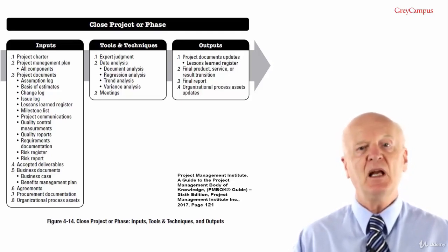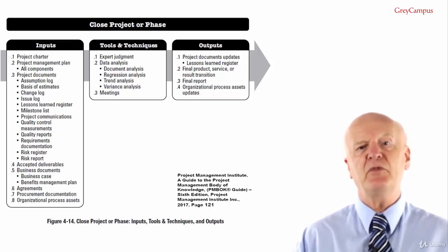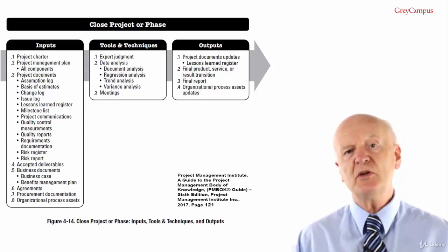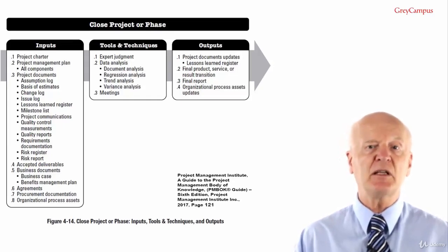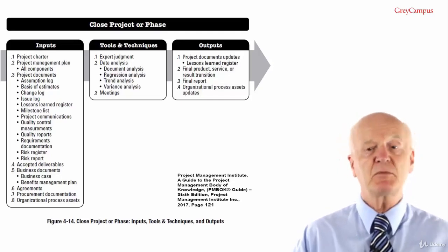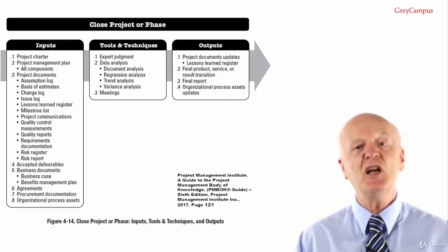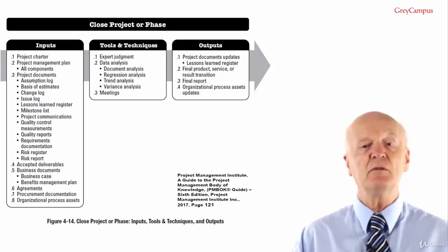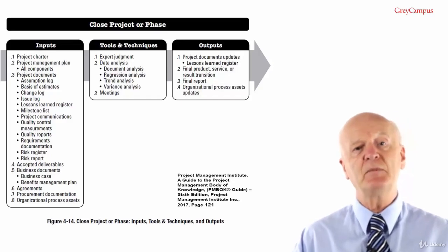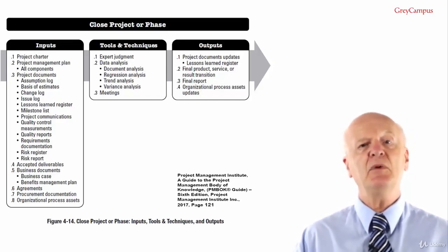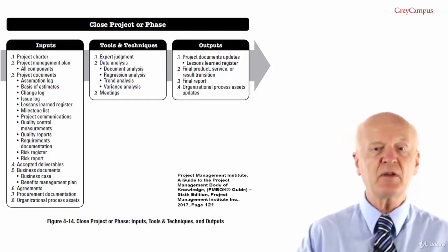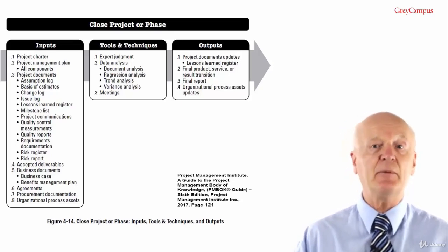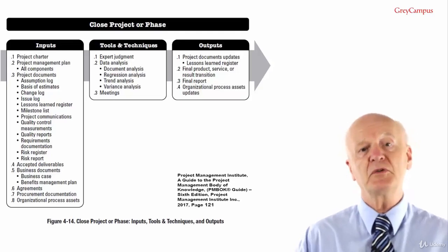Benefits management plan. This plan outlines the target benefits of the project. This will also be used to determine when to confirm when the benefits are to be verified as achieved. For example, it may be 6 months, it may be a year after the project finishes before you can actually harvest all the benefits, so you have to have that gap in between. It will also list who will check them and the criteria to be used. And as I mentioned before, when it says who, I prefer to use an office rather than a person, just in case that person's left the company and no one knows what to do or doesn't bother doing the work.